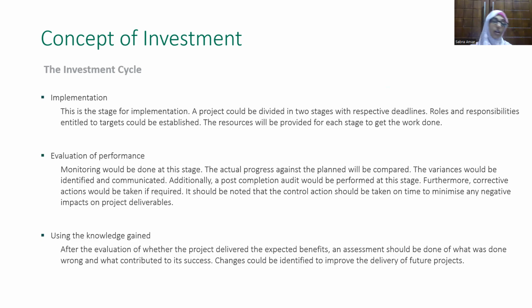there will be a post-completion audit performed in order to see what went wrong, and then corrective action will be taken. So it should be noted that the control action would also be taken on time in order to minimize any negative impacts on project deliverables. So when it comes to the deliverables, the negative impacts will be minimized by using different control actions. So evaluation of the performance will be done using a budget.